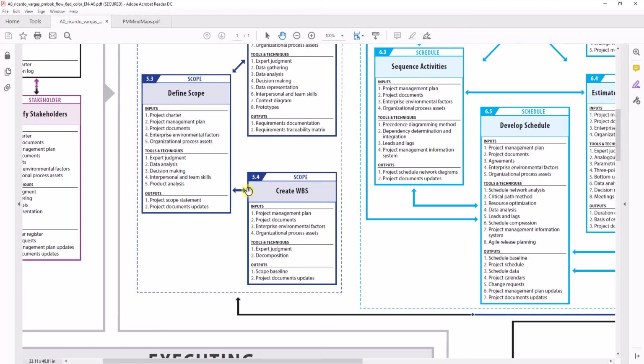Very importantly, the overall budget of the project, which you will define later, you will apportion into what you call control accounts. By allotting the control accounts, you are ensuring that the overall budget plan for the project is split up. So by breaking down this work, you are ensuring that the overall budget can also be accounted for and tracked.